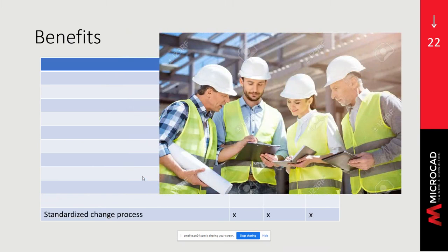And a standardized change process. Having a digital twin as a starting point for all changes means that the as-built can really be trusted. The consultants and contractors making the change will provide updates to the model per the BIM execution plan for that particular change. And that way, the digital twin retains its currency over the course of the years as you have more and more change projects.